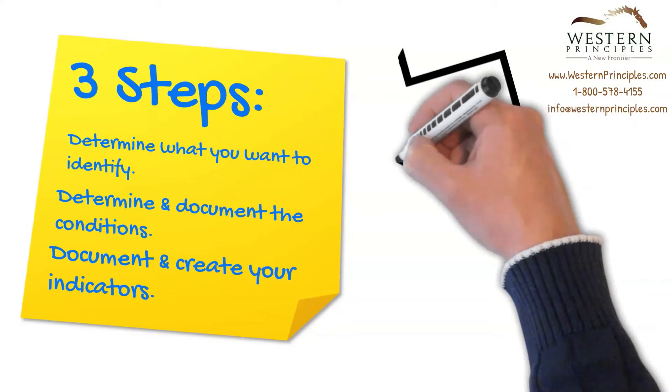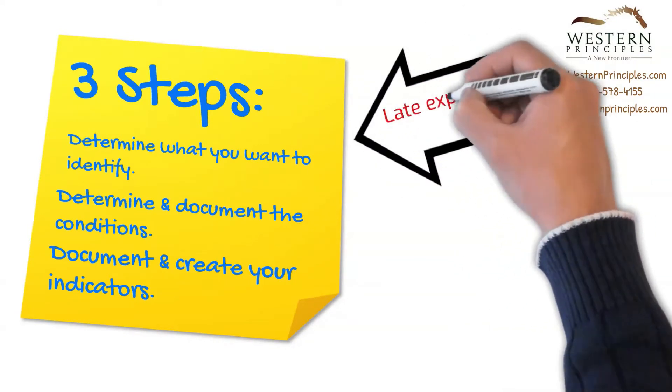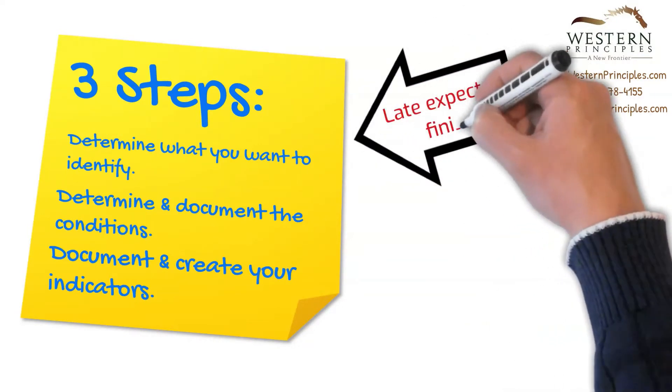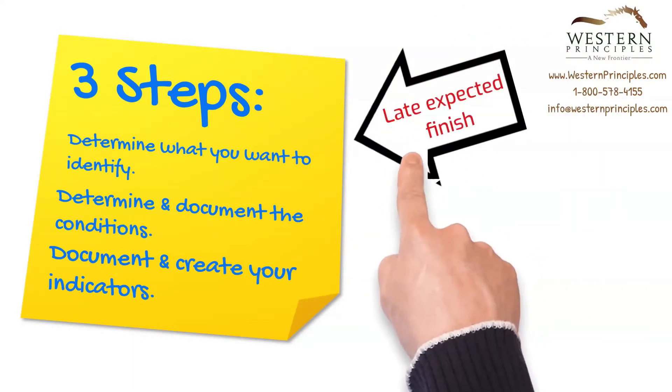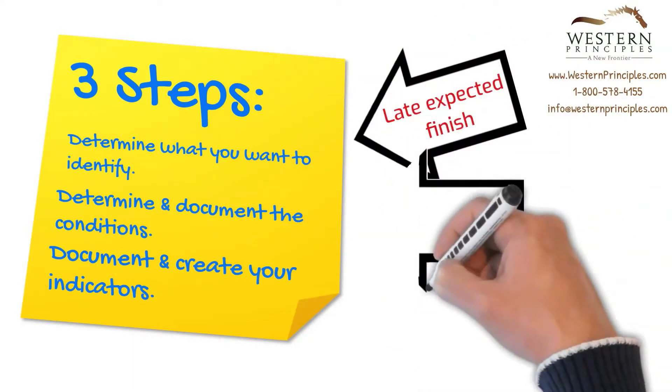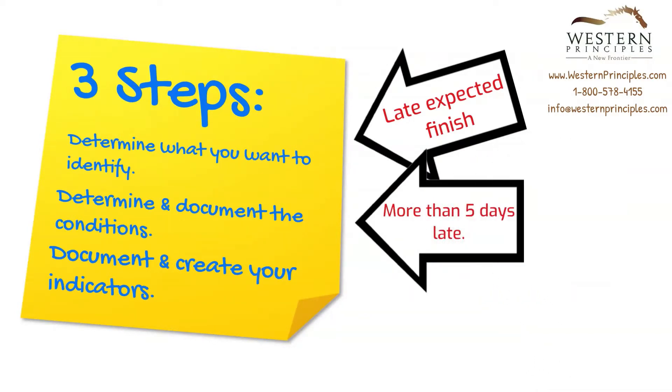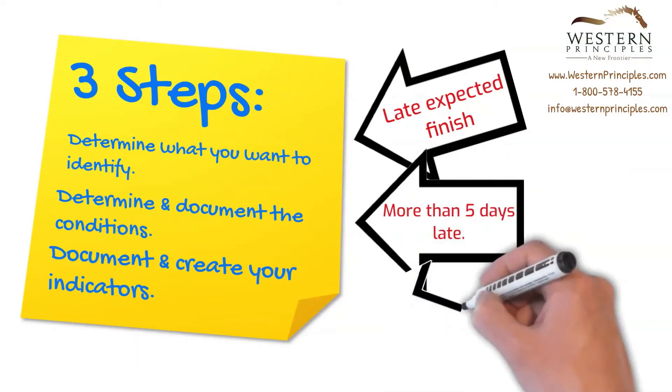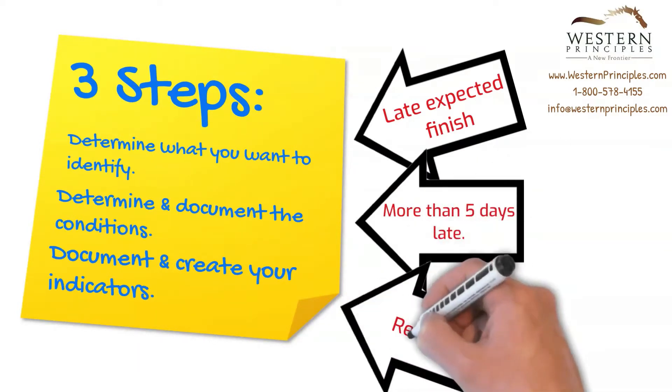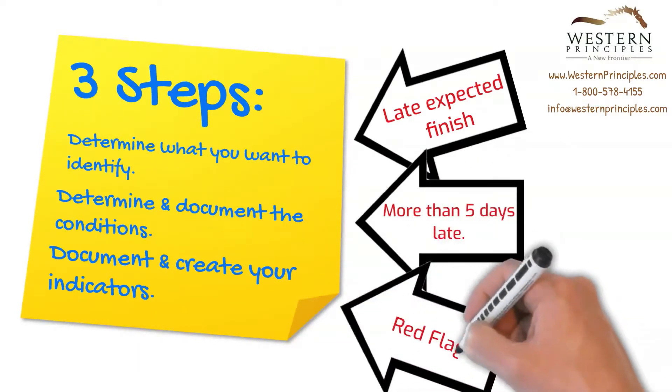For example, maybe we want to communicate when a task is going to be late. In this case, late means that the task will finish five days later than expected. If that happens, the project manager will set a red indicator.